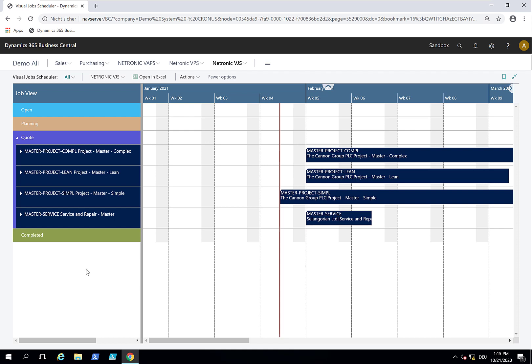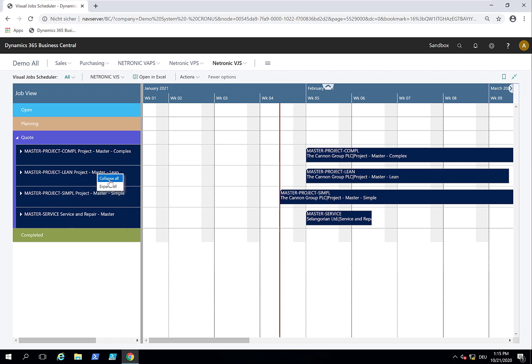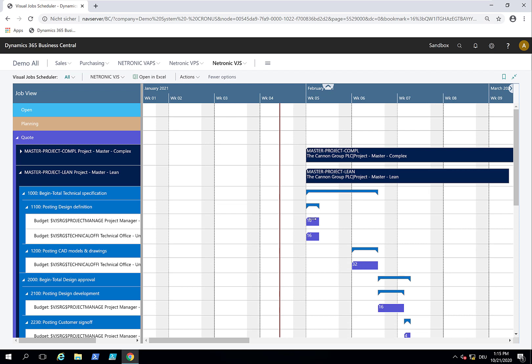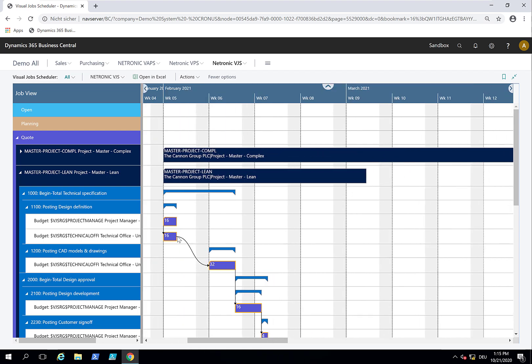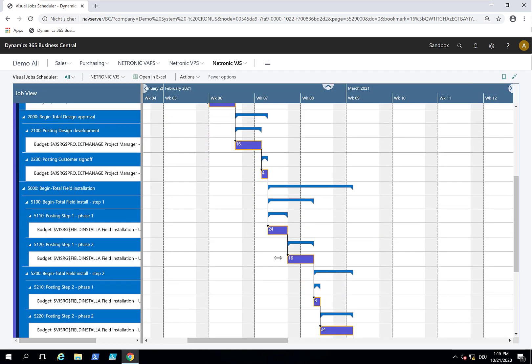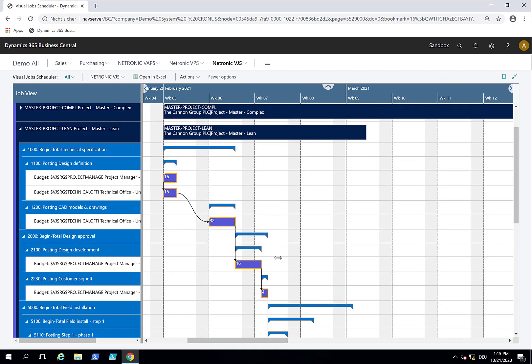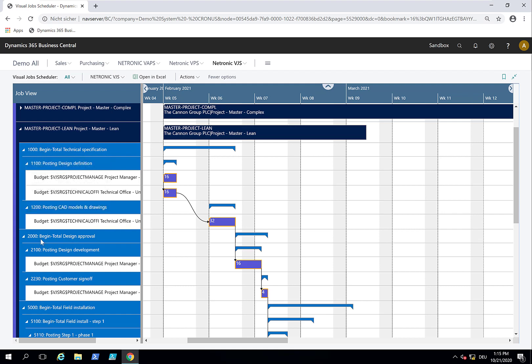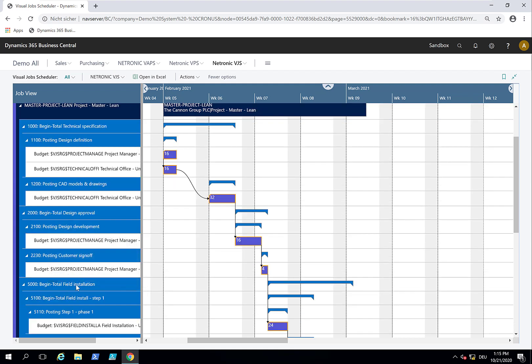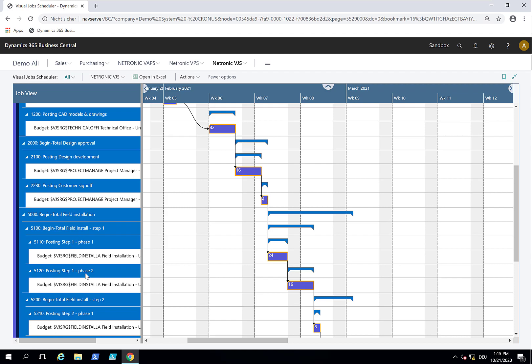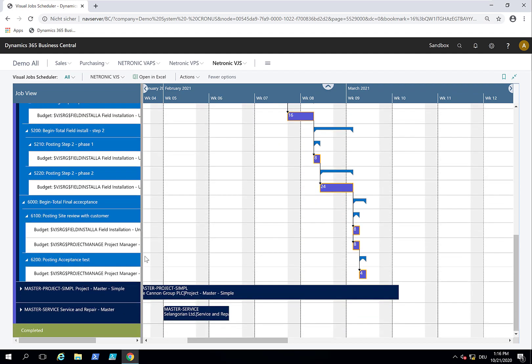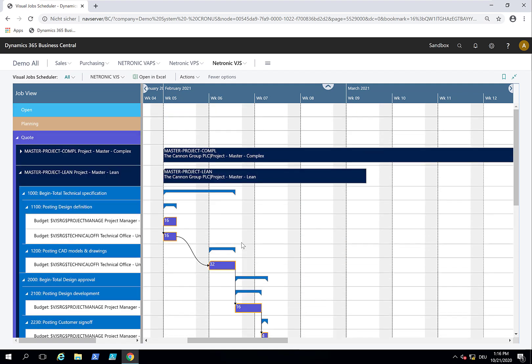We'll take this project master lean template. If we drill down, you can see all these project tasks. When I expand them, we can see all the job tasks and the job planning lines. You see that I defined dependencies, which is a Visual Job Scheduler functionality. This job starts with a technical specification, then a design approval, and then the field installation starts with various phases and steps. We need different types of resources for it. This is my project master lean template.